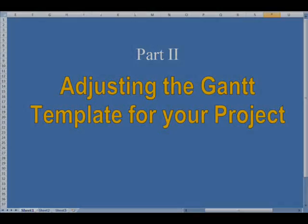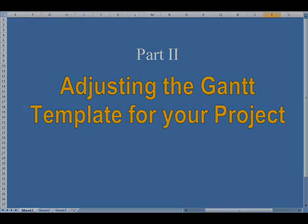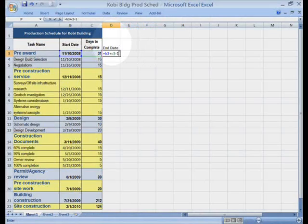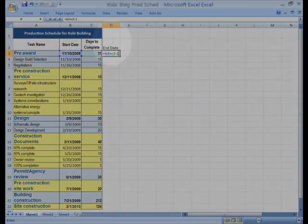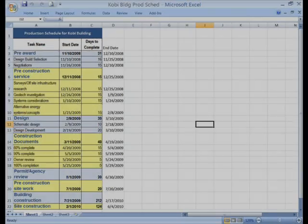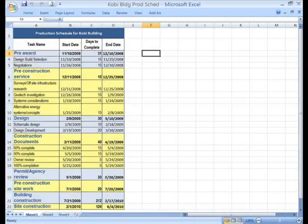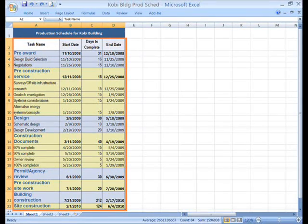In this next part, we'll apply our template to a project. We need to create a Gantt for the COBE building production schedule. First, we'll add the end date formula in the column just to the right. Now copy it all the way down the column, down through the last item on the schedule. You can format the new column to match the rest of the table, but it certainly isn't necessary.